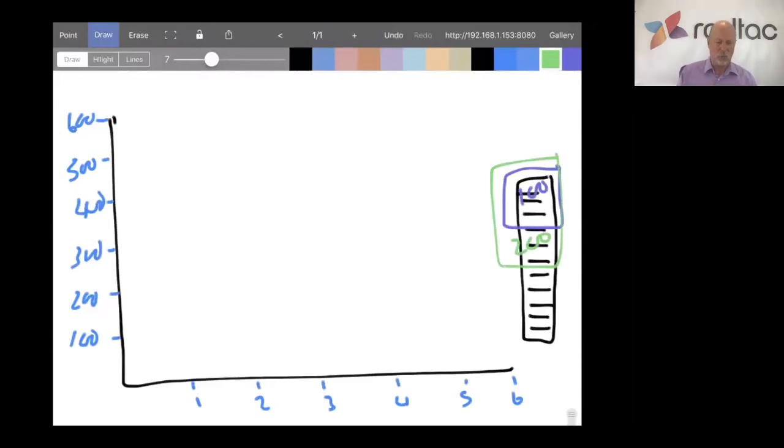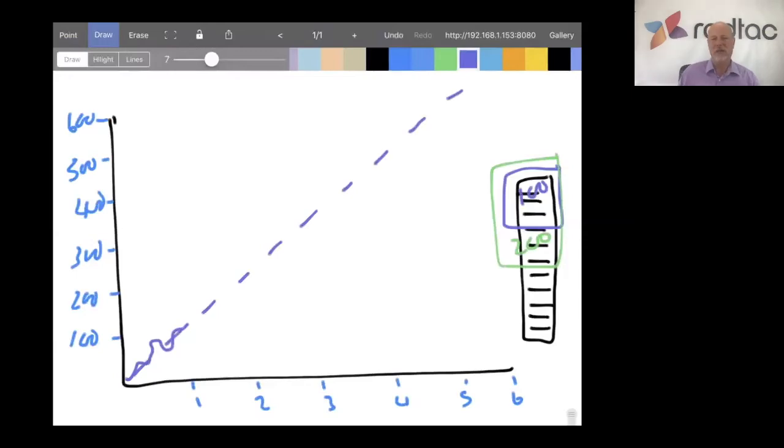So let's have a look at what we can actually use burn-up charts for. Well, what we do over time is we start to hold an idea of what the throughput is. So in this case, velocity. So we start to hold a velocity line. Now, doing this, we can actually start to create a trend. So it looks like, based on factual empirical evidence, that the team delivers this fast.